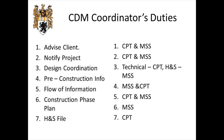Design coordination means checking to make sure everything works all the way through. In the interim stage, when we've got the new atrium but before the NLTB, there are quite a few interfaces to spot and correct. Fire escape routes are one of our biggest problems — in the final version they comply, but at the moment I've got a finished atrium with lovely fire escape routes but nowhere to go from them, so we had to resolve that.